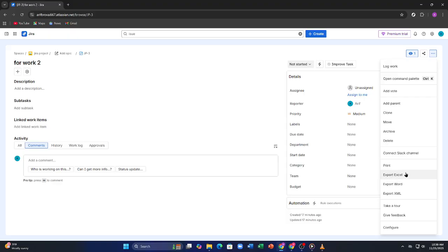Now, Jira usually gives you a couple ways to export. The most common is the full XML export. It's the format Jira uses for project imports later on. If you just need issue lists for spreadsheets, you can choose CSV instead, but for a full project backup, stick with XML. Go ahead and hit export.